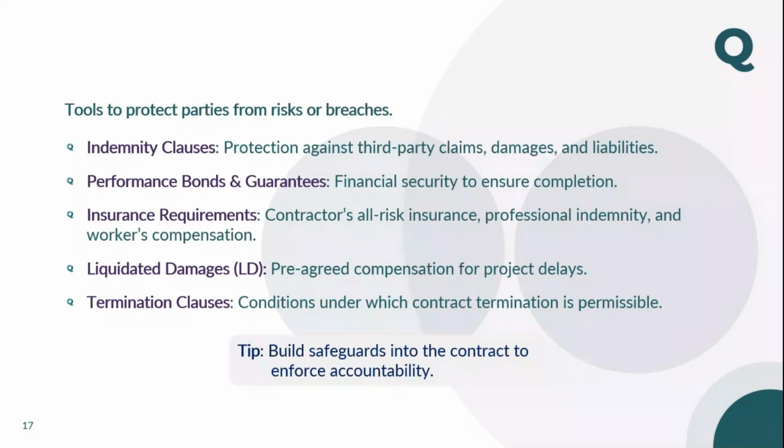contract issues. To cover that, there is a mechanism called collateral warranty, which is a tri-party agreement between the employer, contractor, and subcontractor. Okay, so those things should be there. Also, you will be buying a lot of equipment, so you have to check that warranties from the manufacturers are in place. So this is basically how you safeguard and waterproof your contract. Let us see the next section: after safeguarding, what would you do in terms of contractual arrangements?